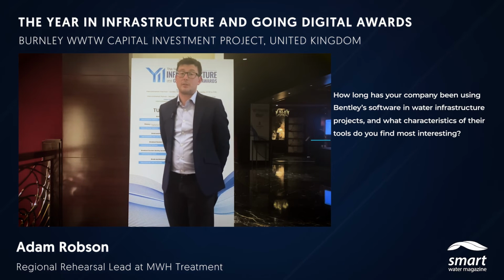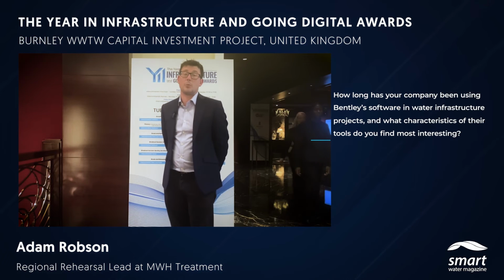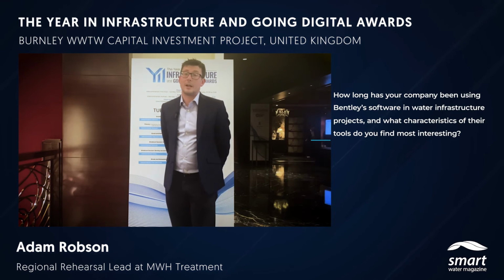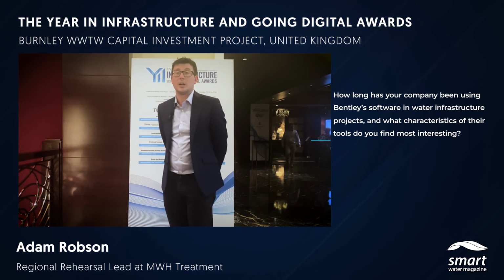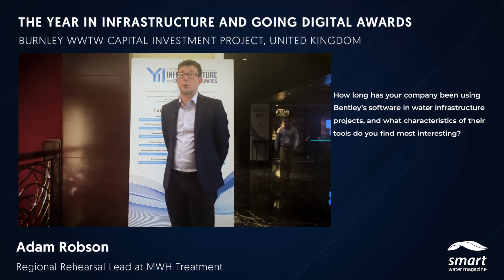There have been some other benefits. It's aided the health and safety performance on the project, as well as some of the carbon reduction measures. We have been able to recycle some hard standing areas and some piling platforms. We've been able to reuse that stone multiple times, as well as reduce the amount of water usage on site when it comes to the hydrostatic testing.